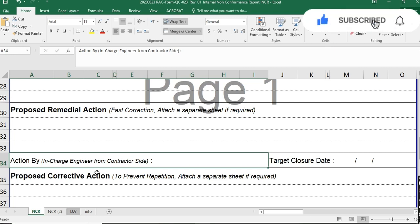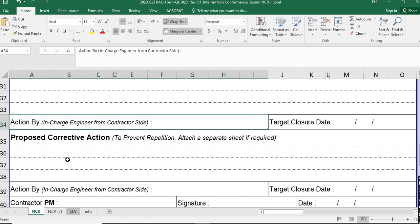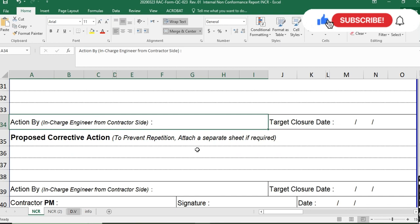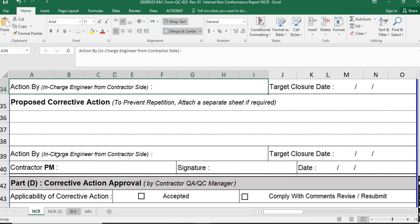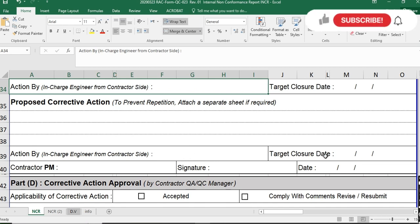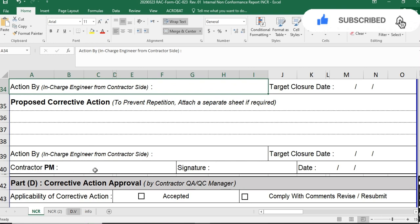This section covers the immediate remedial action. They also propose their corrective action to prevent repetition, attaching a separate sheet if required, and write the proposed corrective action for the non-conformity. Then the site engineer or construction manager name, target closure date, contractor project manager name, signature, and date are filled in.